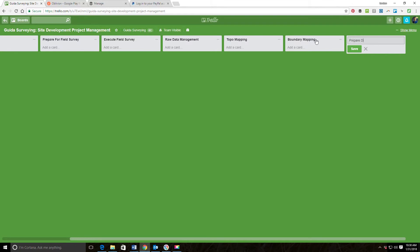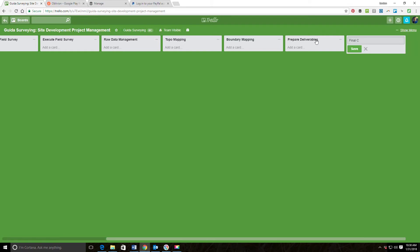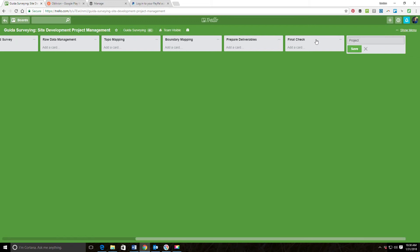One of the last things we're going to do is Prepare Deliverables, and then I'll probably add a QA. We'll just call it Final Check, so we're going to do some final quality control. Then I'm going to have a Project Closeout because I like to have a slightly formal project closeout process.